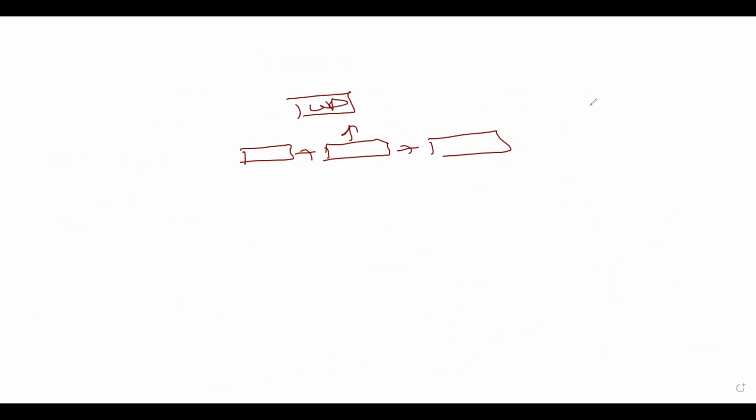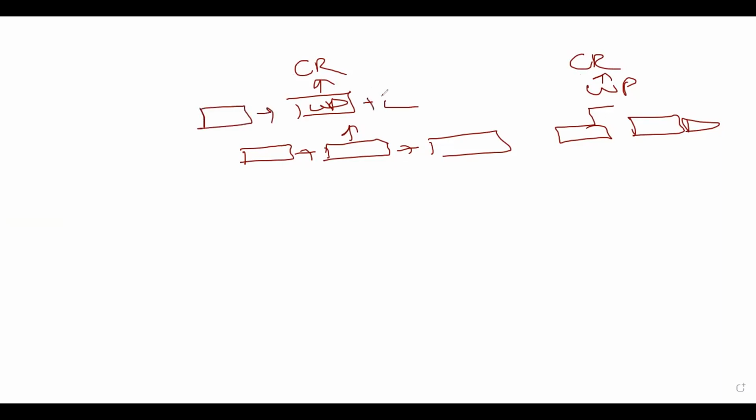Similarly, there could be multiple control accounts and multiple work packages, and multiple work packages will have multiple activities. Above the work package, we have to add contingency reserves for each work package. Once we add all work packages, above them we have what? Control accounts. What are control accounts? They contain code of accounts, and work packages contain code of identifiers in order to calculate the cost. Control accounts are used for accounting purposes, for invoicing purposes.